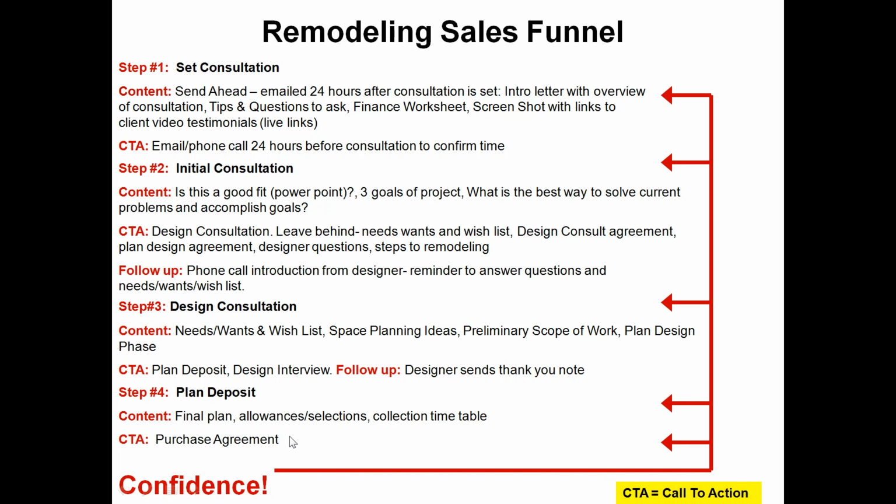And read the information below on the unforeseen circumstances. That's where you open up a wall, and of course you didn't know what was in there, and of course the allowances need to be recapped, preferably before you get into the contract.